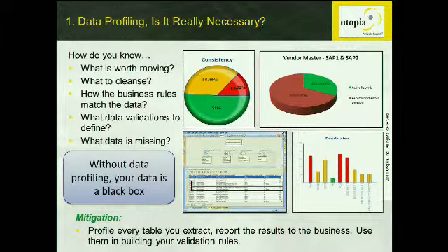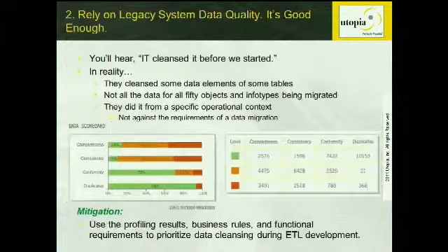So data profiling, is it really necessary? Well, I get to ask this question, if we don't profile our data before we do the migration, how do we know what's worth moving? How do we know what we have to cleanse? How do we know how dirty the data is? Without profiling the information, we're conducting the operation in the dark. And so the mitigation here is profile every table you extract, report the results to the business, and use those results in the subsequent process of the migration effort, such as business validation. Profiling kicks off the process.